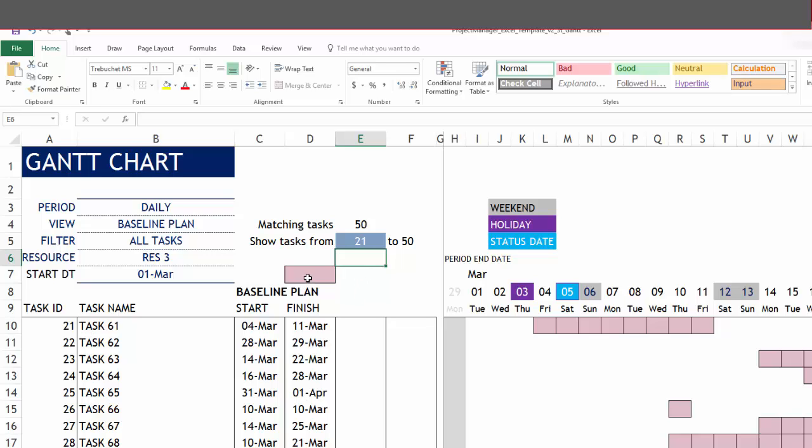We've already seen the legend and the dates. They update according to the options here in the date header. This shows the holiday, for example, March 3 is a holiday. March 5 is the status date according to what we entered in the project report.